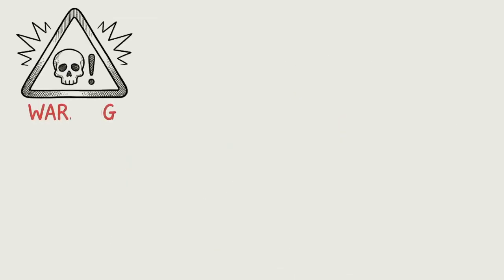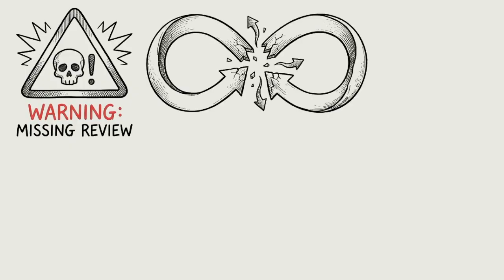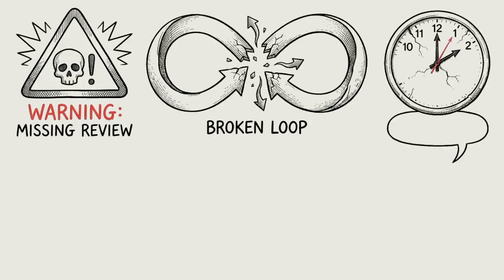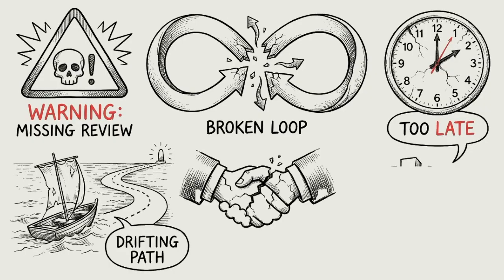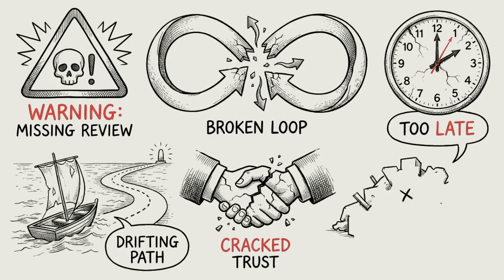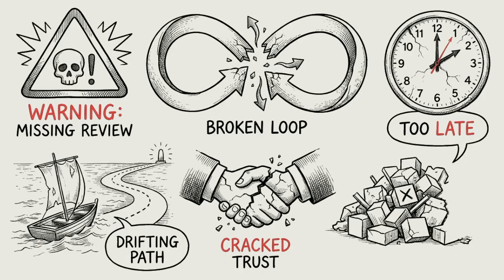If a Scrum team fails to have a sprint review meeting, they lose a critical feedback loop. Stakeholders may discover problems too late, the product backlog may drift away from real needs, and trust can erode. Over time, the team risks delivering work that is technically complete but does not maximize value, leading to more rework, surprises, and slower learning.